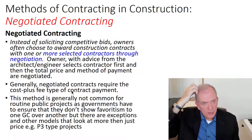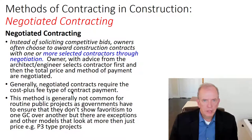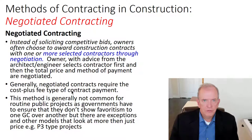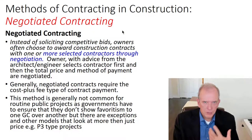In negotiated contracting, the owner — often working with their consultants, architects, or engineering firm — selects the contractor first, and then the total price and method of payment are negotiated. These contracts tend to lean toward cost plus or design-build methodologies. It's not that common in the public sector but is definitely significant in the private sector, especially with clients who do a lot of construction work and feel comfortable with this method.